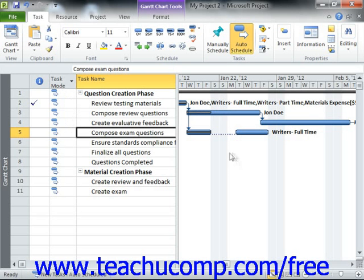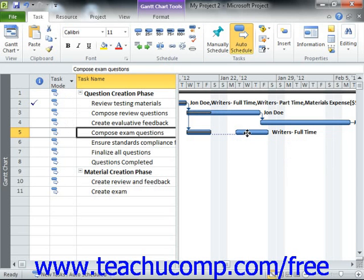If you dragged the second segment to the wrong date by accident, you can just click and drag the second segment until the start date of the second segment is on the desired date. This can happen as you're first learning to split tasks with your mouse. Also note that you can split a task multiple times as needed.